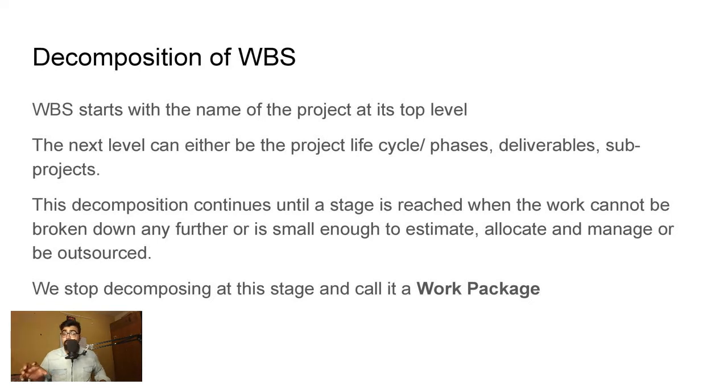So the project manager will track the progress of the work package to ensure the work breakdown structure is properly achieved. In this case, it's a bottom up approach where if you start completing your work packages one by one, it will automatically lead to the previous level in the hierarchy.